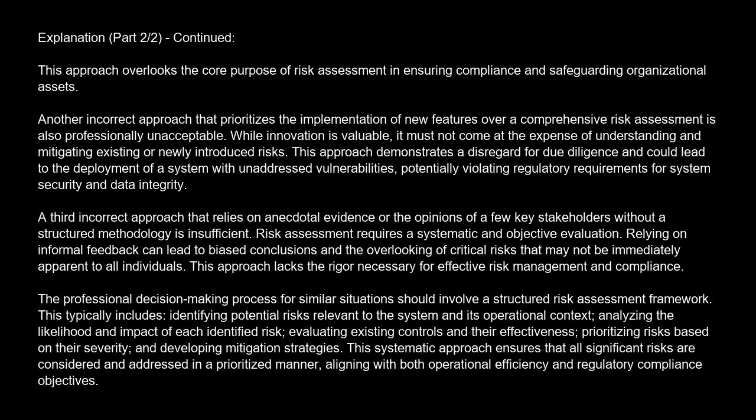The professional decision-making process for similar situations should involve a structured risk assessment framework. This typically includes identifying potential risks relevant to the system and its operational context, analyzing the likelihood and impact of each identified risk, evaluating existing controls and their effectiveness, prioritizing risks based on their severity, and developing mitigation strategies. This systematic approach ensures that all significant risks are considered and addressed in a prioritized manner, aligning with both operational efficiency and regulatory compliance objectives.